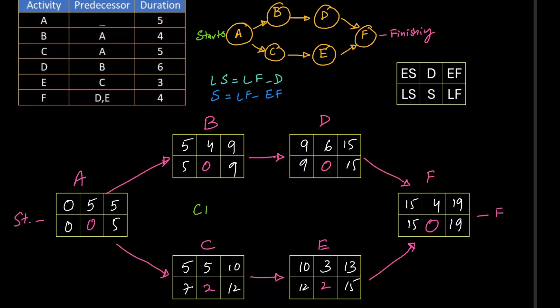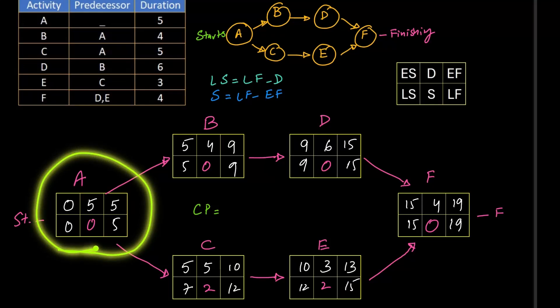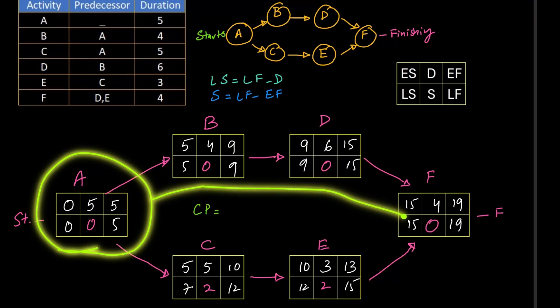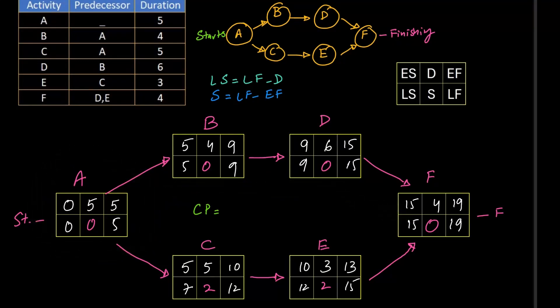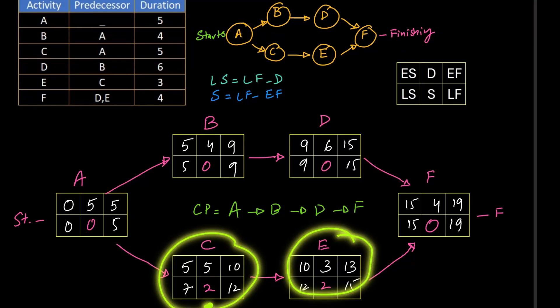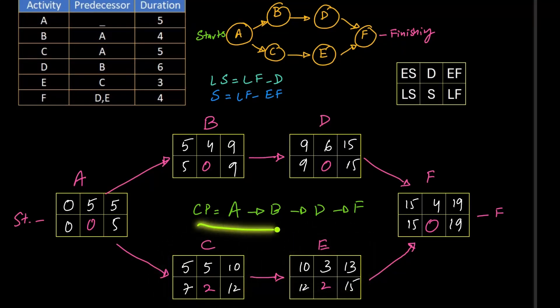We need to find the critical path for the project. And critical path is a straight line of slacks from start to end of the project. Here in this project, A, B, D and F, these are straight slacks, so the critical path will be A, B, D and F. Why we have not included C and E? Because they do not carry slack of 0 in them, so they can be excluded from this critical path.